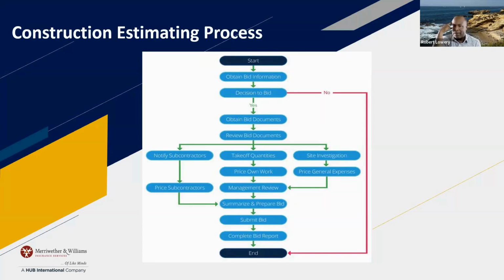They're going to tell you what the markup is. If you're performing, they might say you can do a 10% markup. If you're managing somebody, you can only mark up 5%, right? That's your admin on it. But like I said, with time and material, if you really don't know what it is, say, hey, I need a number really quick because we need to keep this project going. You can give them a ROM, rough order of magnitude, and time and material not to exceed, then you're going to be tracking your labor and material daily. That way you're tracking on that change order. So there are a number of ways to keep the job moving, but you have to let them know right up front once you find these changes in scope.